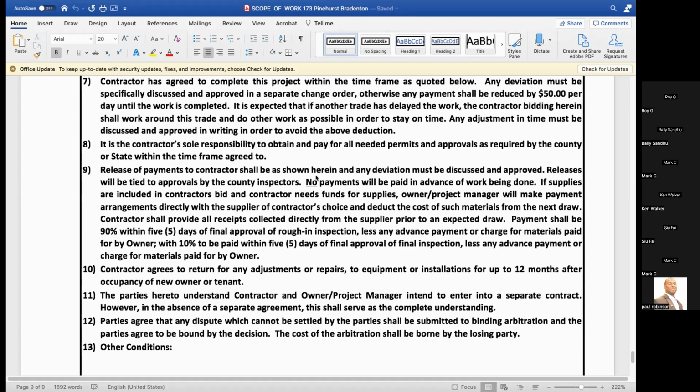Wow. And then so it ends up being something like $5,000 at the end of the day. But what I did was, basically looked at what it's costing me, in very rough numbers, in the end if we go over a month and a half in this project, which isn't atypical, especially in the past couple of years. So let's split that cost. That's kind of how I broke that down. Yeah, that's very smart.